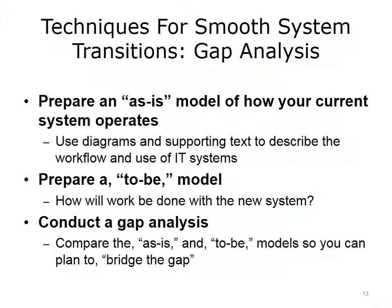For example, in a gap analysis you can help address questions such as: How will you get from as-is to to-be systems? What steps will you take, and in what order? What does that imply for the training that will be needed for the staff? What stakeholders must be notified and involved to have a successful implementation?